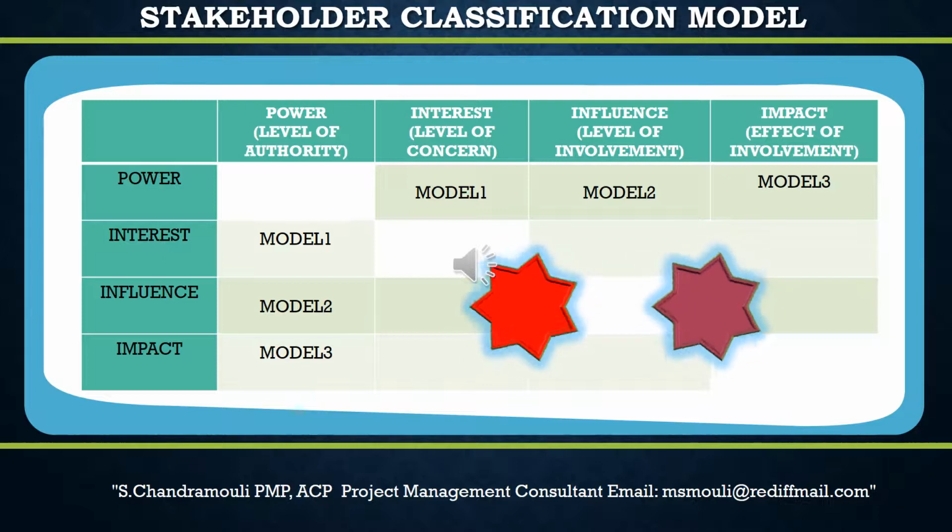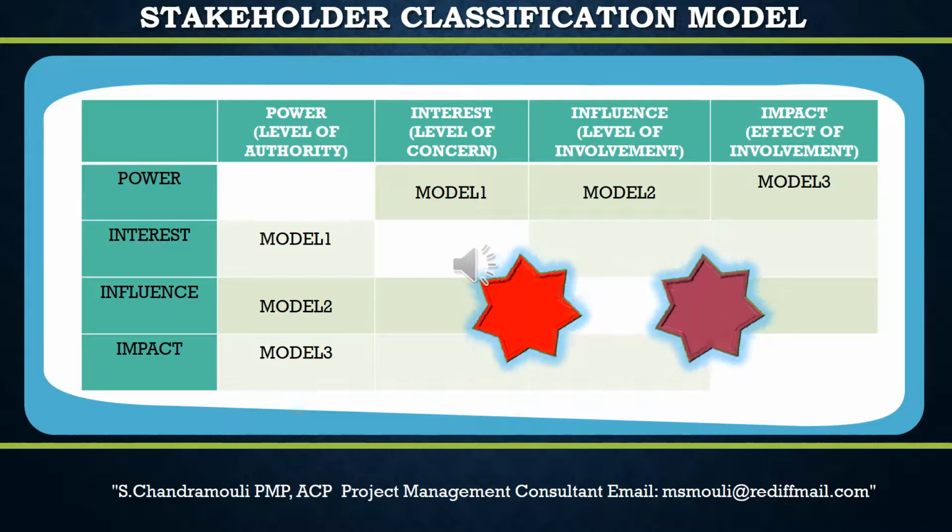To increase the chances of success, the process of stakeholder identification and engagement should commence as soon as possible, after the project charter has been approved, the project manager has been assigned, and the team begins to form.